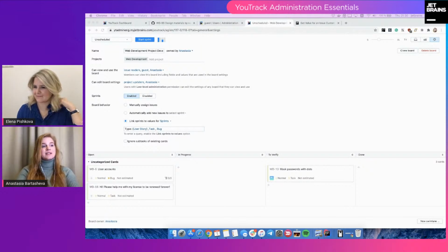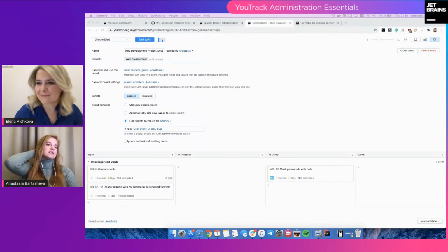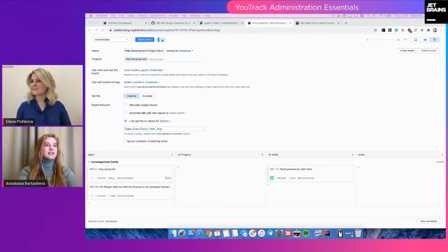So you may have a separate field in your project that will display a percentage of how much of the task is completed, like 50%. This value can be calculated using the estimation values and original estimation or spent time, whichever you find better.